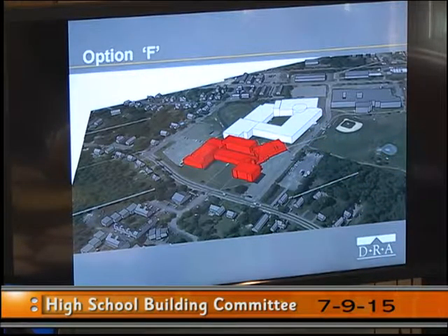So when we talk with the MSBA, right now in this family of options, we're showing what, 1, 2, 3, 4. There may be more than that. There may be certain solutions for the building and multiple locations for that kind of building on the site. So we want to clarify with them what it means when we talk about options, because one of the things we'll all find, the trend now with MSBA, is they want us to focus in on a solution very early on, even though we're trying to be very theoretical about this and keep it at a high level and talk about little rectangles here and not buildings, not designs yet. They want to see it as designs as early as possible.